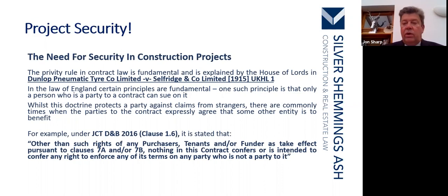So, who is it that can take action in relation to any contract? Shortly, it is only the parties to the contract. It is not Joe Bloggs who lives 4 streets down. He has not got any privity. And the privity rule in contract law is fundamental and is explained at the House of Lords in Dunlop Pneumatic Tyres and Selfridge & Co. Limited.